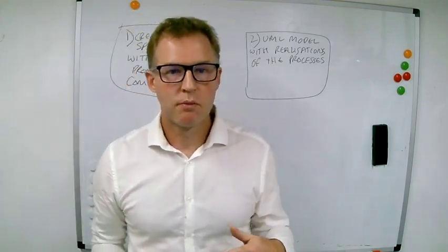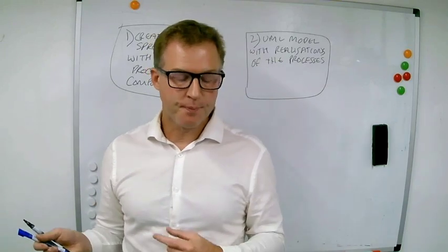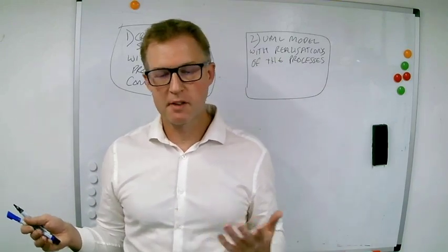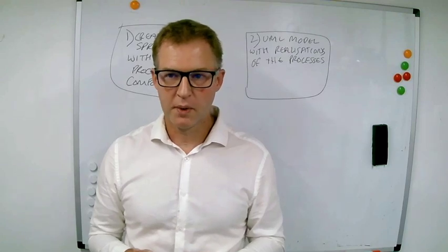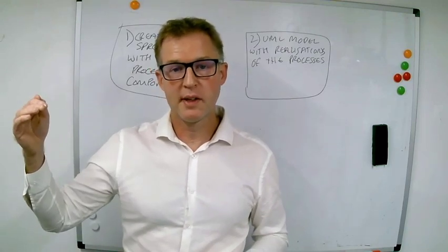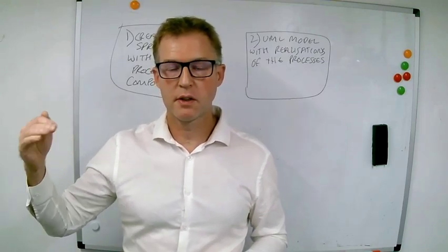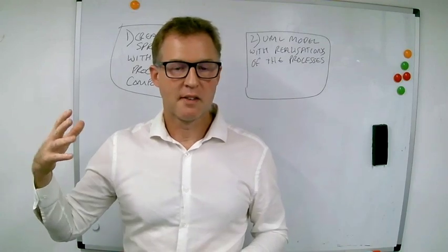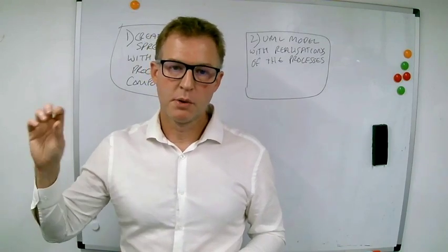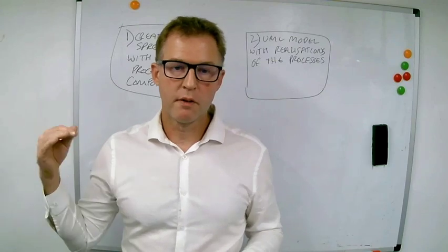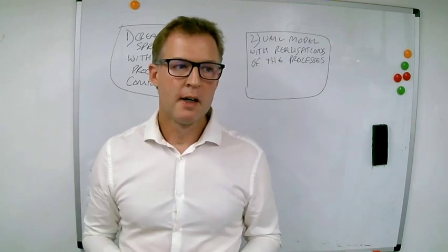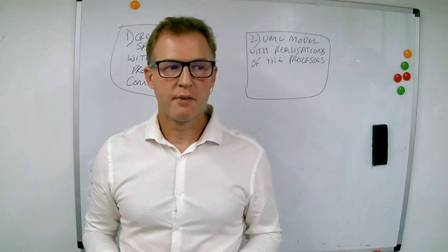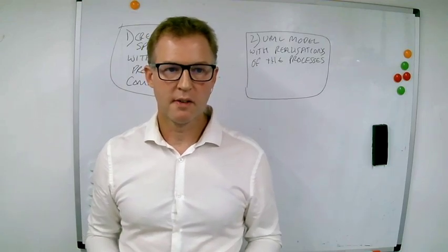When we're doing these realizations, we had a spreadsheet. Again, it sounds like I love spreadsheets. Just a basic way of keeping lists, where we would list out any activities, any questions, any outstanding bits and pieces, and put owners against them. So, you've got your SMEs, you've got your solution architects there, but the reality is they're not going to know every single answer.